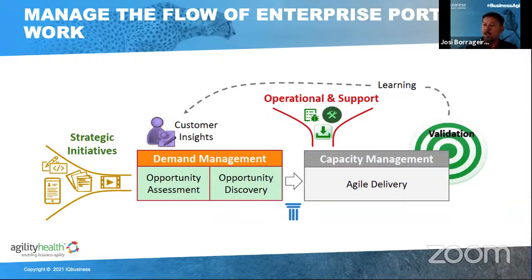known either as quarterly planning, big group planning, or PI planning, in order to bring that to the fore. And that gets managed by your typical triad, the product management, architecture, and release train engineers that help plan that work in preparation for your PI planning scenario.